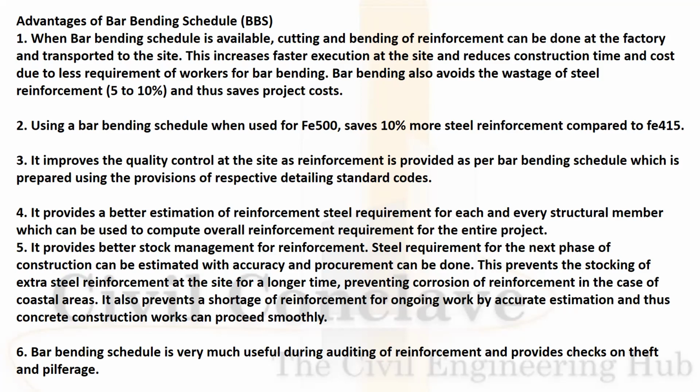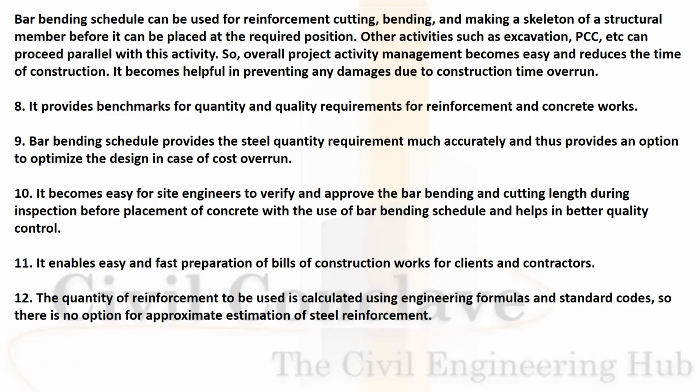It also prevents shortage of reinforcement for ongoing work by accurate estimation, and concreting construction works can proceed smoothly. Bar bending schedule is very useful during auditing of reinforcement and provides checks against thefts and pilferage.